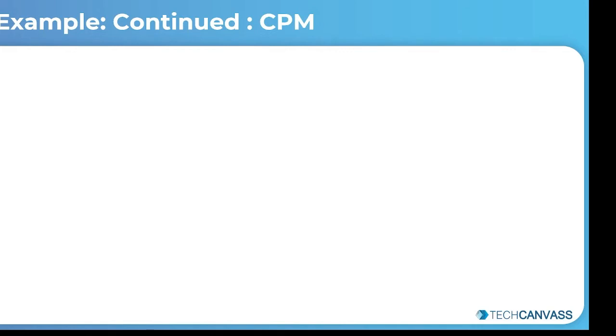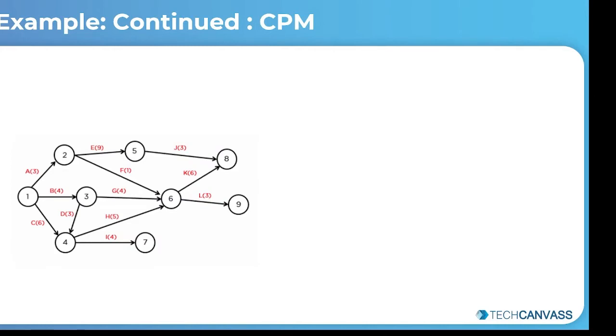Next, let's continue with activity L. The table shown in the previous slide indicates that L, M, and N don't act as immediate predecessors for any other activity. Hence, it can be assumed that they will connect to the final node. So L is preceded by activities F, G, and H. The arc can be drawn like this.